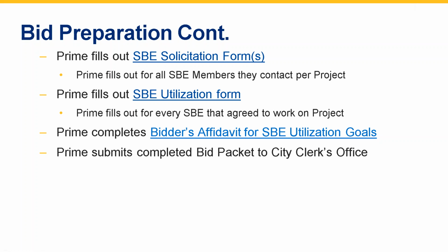The letter of intent is a document that basically confirms that the prime contractor and the subcontractor have an agreement of the amount solicited for prior to awarding the project. It is the prime contractor's responsibility to make sure the letter of intent is submitted by the Thursday following the Friday's bid opening. So that would literally be 4 working days after that Friday's bid opening, submitting that letter of intent. The subcontractor must sign off on that letter of intent. As I said, that is our confirmation that you two companies are in agreement of that dollar amount.